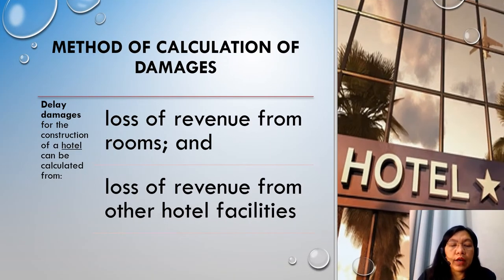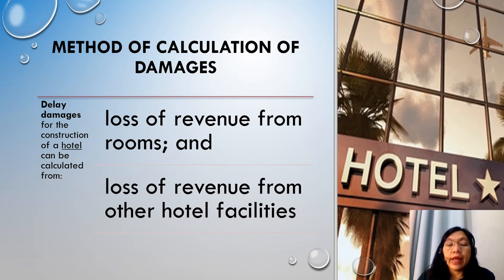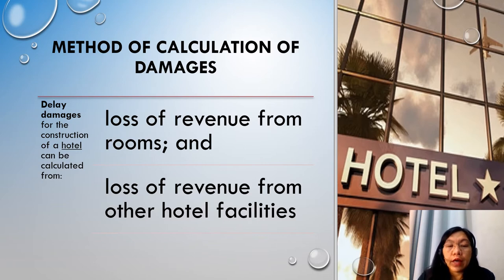Now we will proceed with the method of calculation of damages. Delay damages for the construction of a hotel, for example, can be calculated from the loss of revenue from rooms and from other hotel facilities. The calculation may consider the occupancy levels of a hotel in operation, room charge rates, income from restaurants and leisure facilities such as gyms, swimming pools, meeting rooms, and conference bookings. The calculation must also consider costs that may be saved as a result of the delay, such as utility consumption costs, and cannot be based purely on revenue alone.